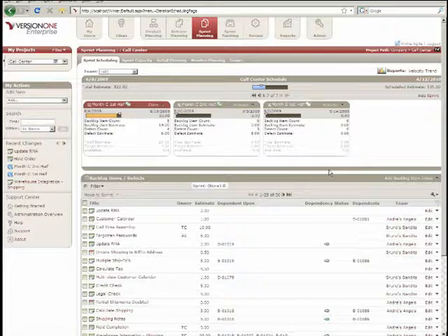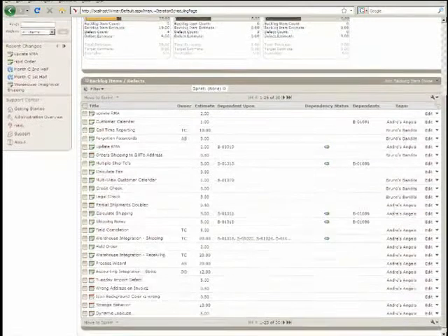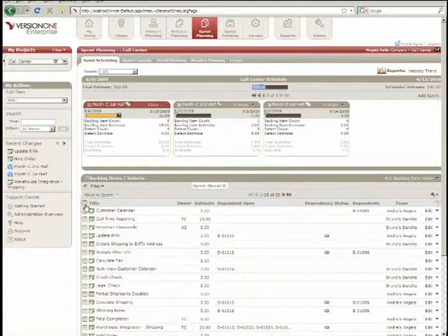So remember how the product owner had ranked or prioritized that product backlog in the product planning area. Now that same product backlog is in the same order, and it's going to help remove ambiguity for the teams. So the teams know right from the get-go to grab items from the top of the list and drag and drop them into the sprint bucket, or we can multi-select several items if we choose to, and move those to the sprint that we're planning.